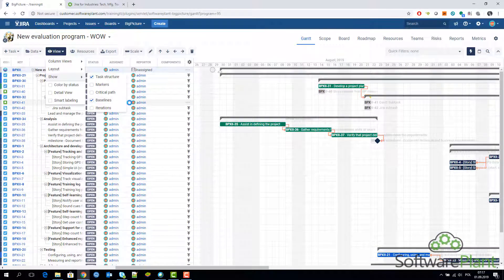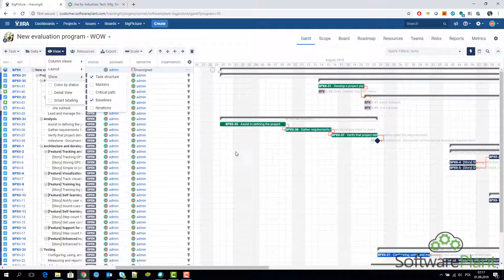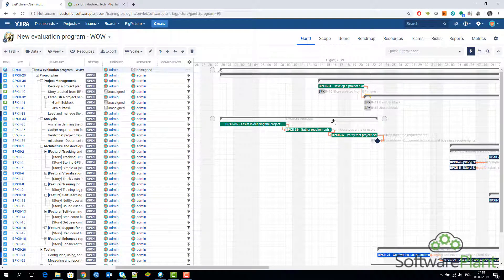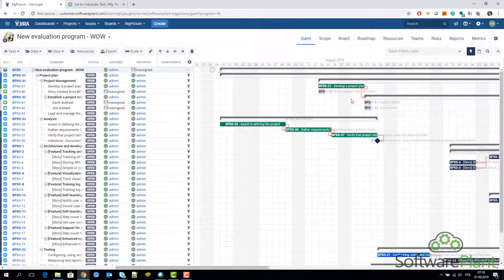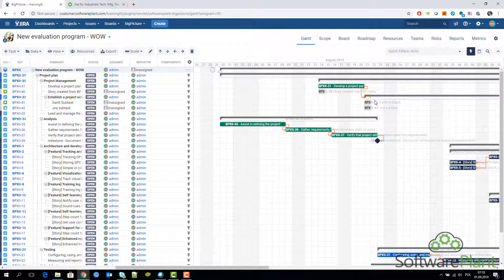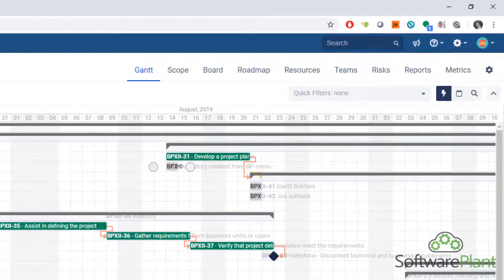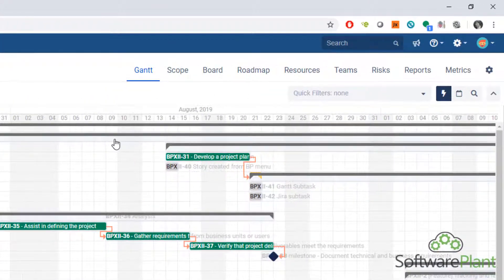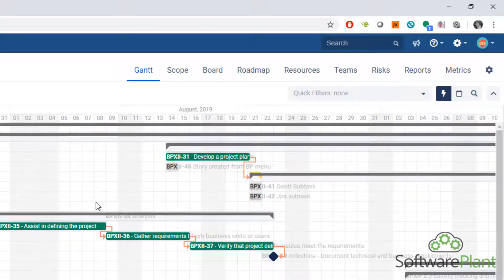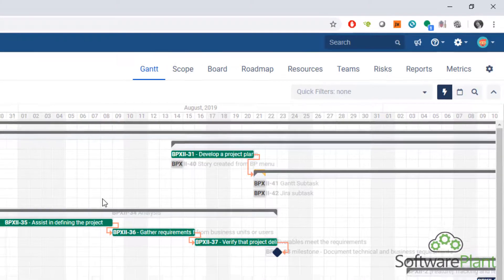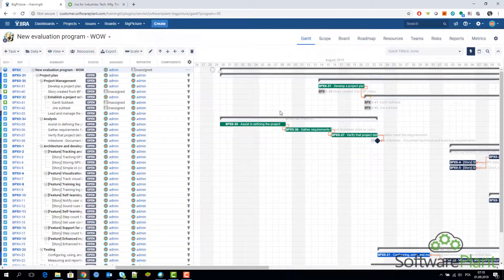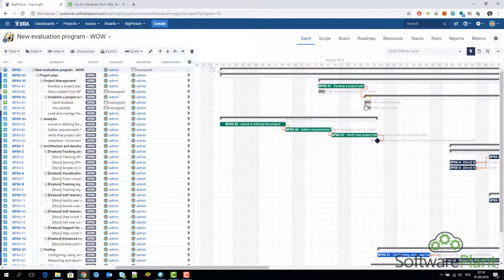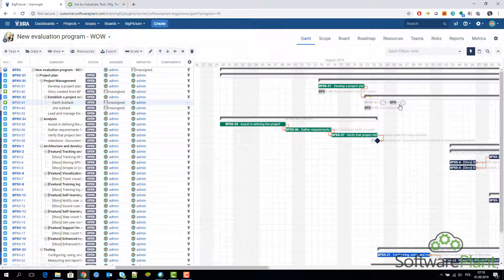If you want to see baselines you need to actually enable baselines in the view menu. You have to go here, click baselines, and then baselines will be visible. You should have seen the change on a Gantt chart. What happened is that kind of ghost issues have appeared on a baseline.